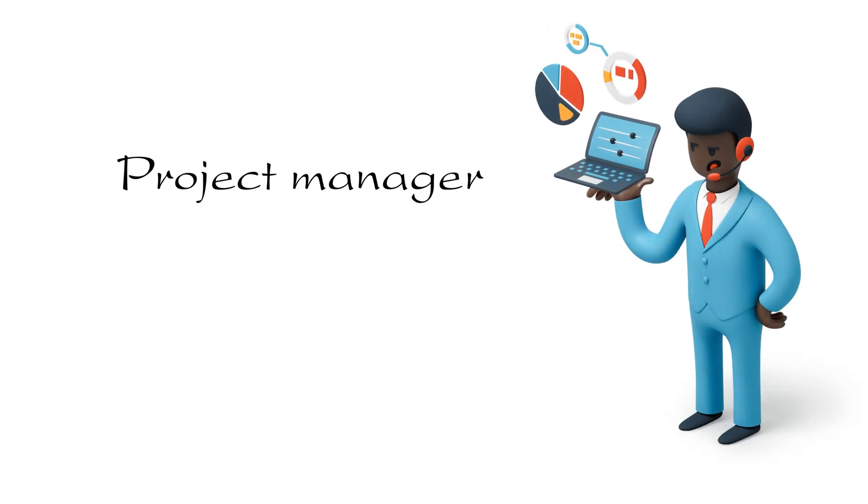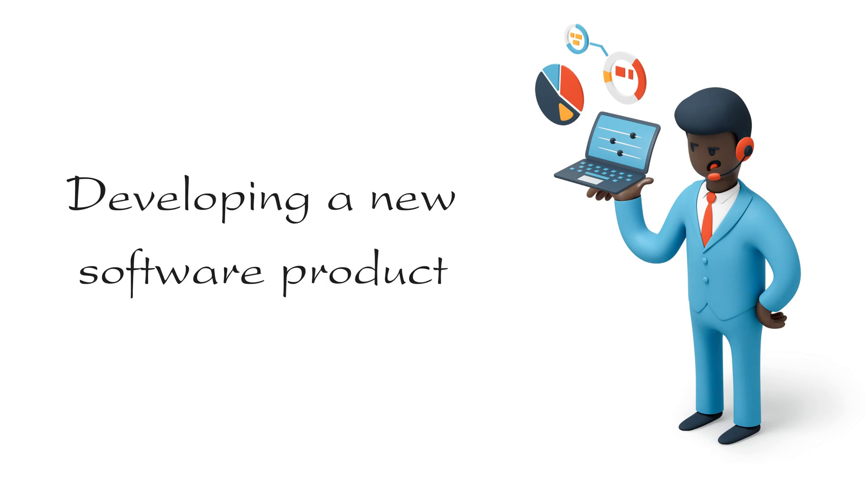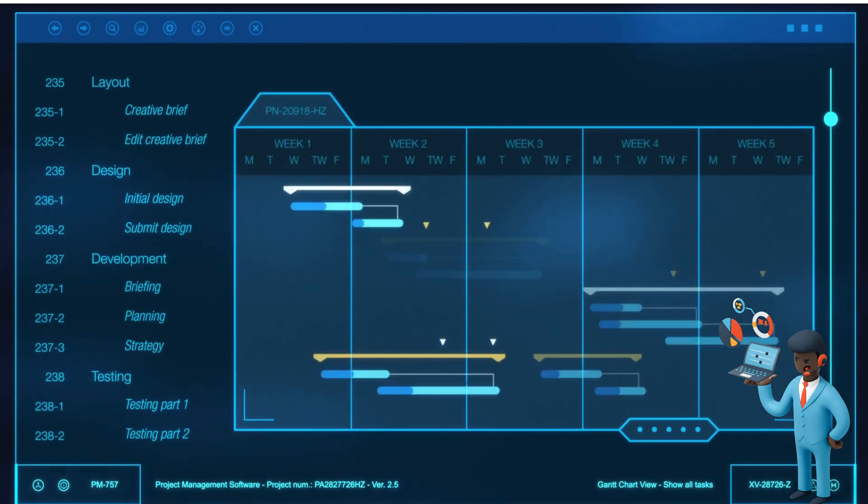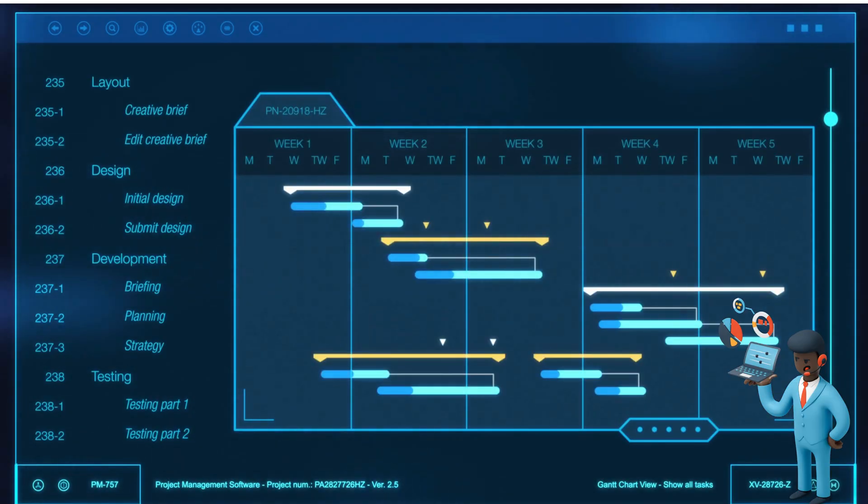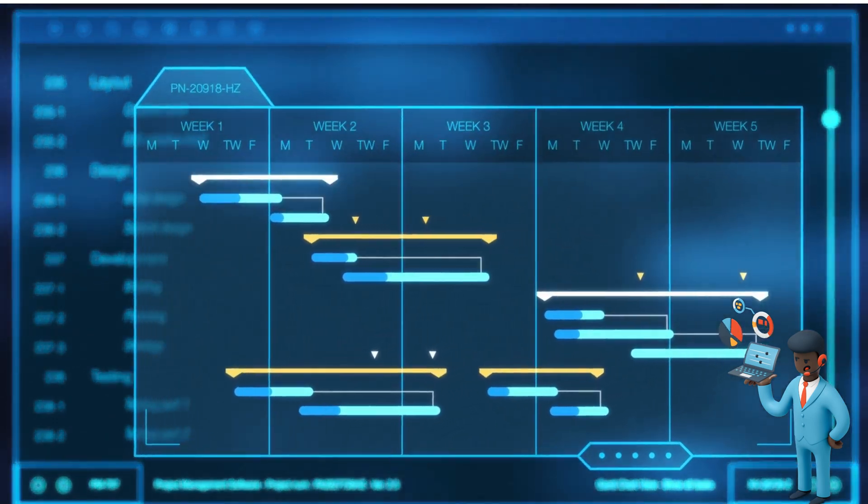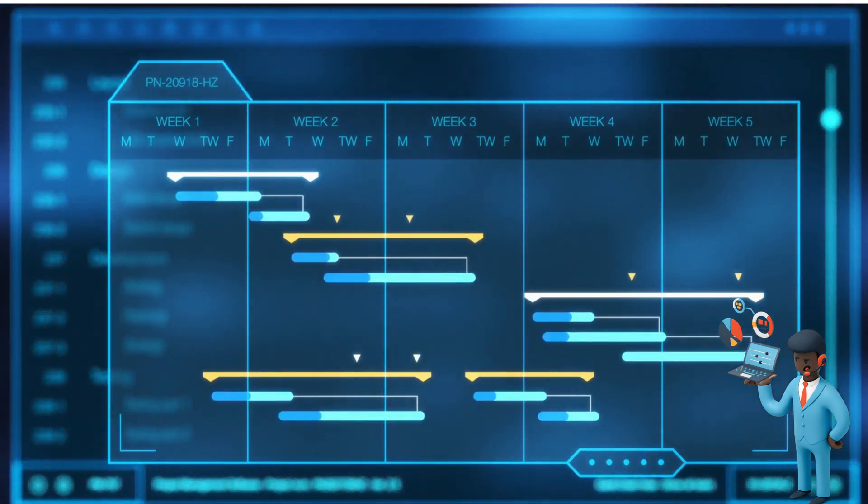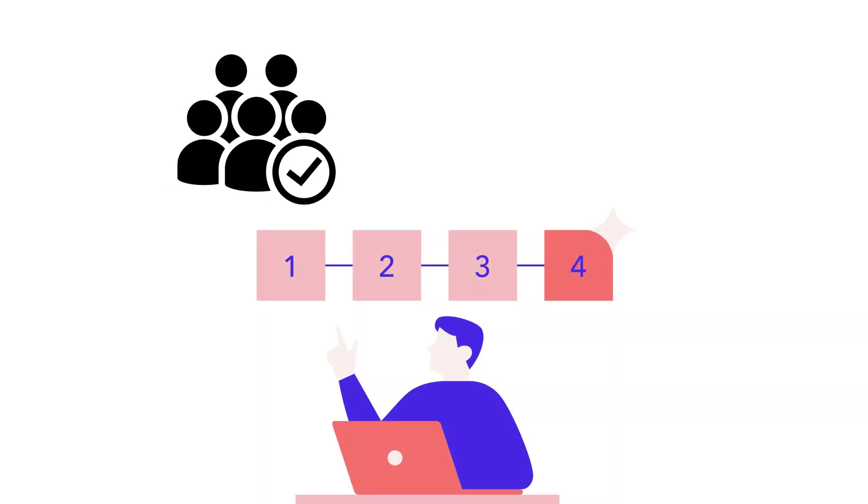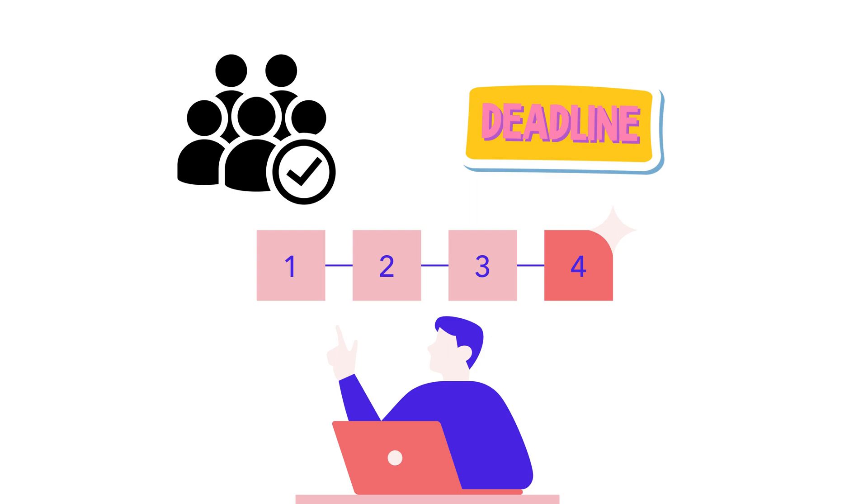For example, let's say you are a project manager responsible for developing a new software product. You could use a WBS Gantt Chart to break down the project into smaller components. You can then assign resources to each task and set deadlines for completion.